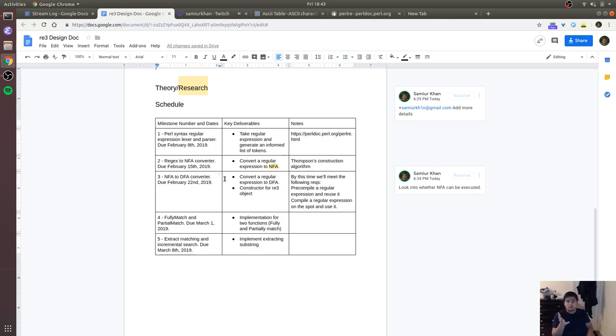Thompson's construction algorithm is a relatively simple conversion of certain regular expressions to other things. So I don't think we'll need a week. Or rather, I think we'll need more time on this. So we can bump that up, I think, 3 days. Bump all of these by 3 days. So this will be 4th. This will be 11th. Okay. I think this stage will probably be the hardest one. Week 3 will be our hardest. Yeah. Alright.